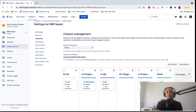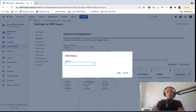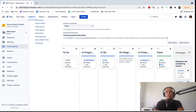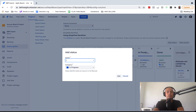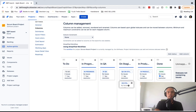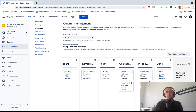You could create a status called 'QA on Staging' so QA knows it needs to test on staging. Then you could have another status 'QA on Staging Passed' so the team knows it's ready for deployment to production. Then Production, then Done. It really depends on what your team does — the simplest workflow would be: To Do, In Progress, QA, Staging, Production, Done. You can structure it any way you want.